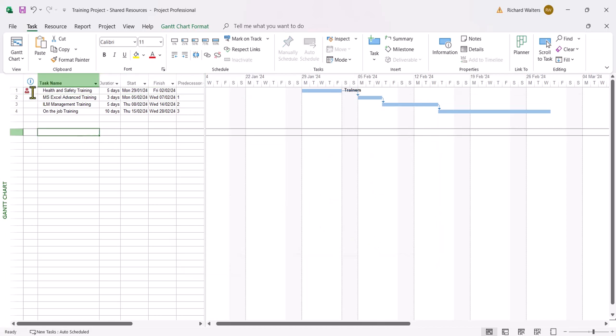And there we go — we've got a red conflict. So we're going to let the resource pool decide who gets which part of the Trainers. We could split it: for example, health and safety training gets 80% of the Trainers and the other project gets 20%. So 80 plus 20 means 100% allocation, which would get rid of the red over-allocation. So that's what we'll do in this example.